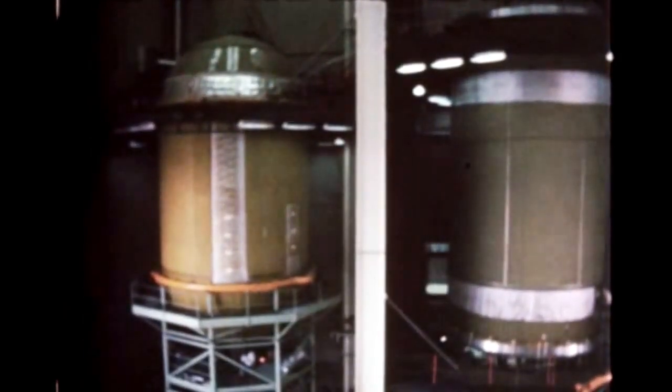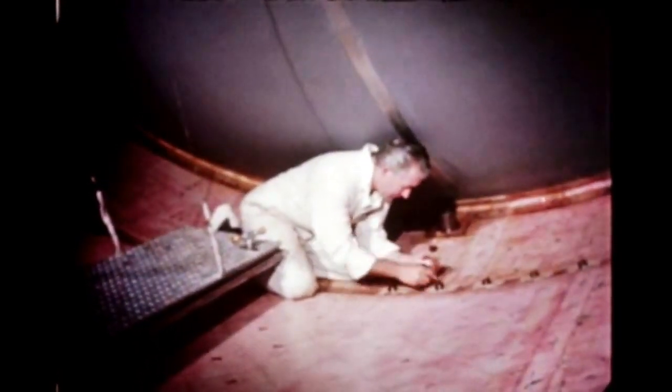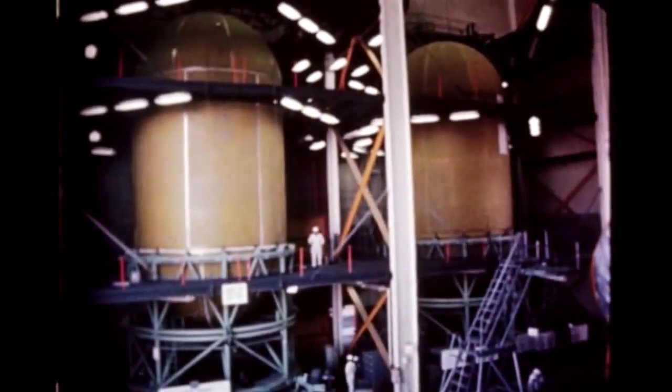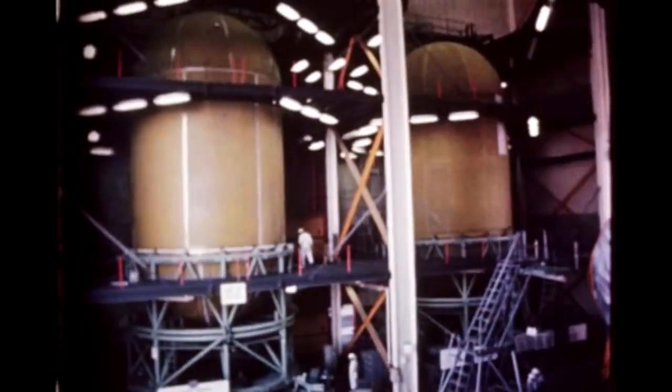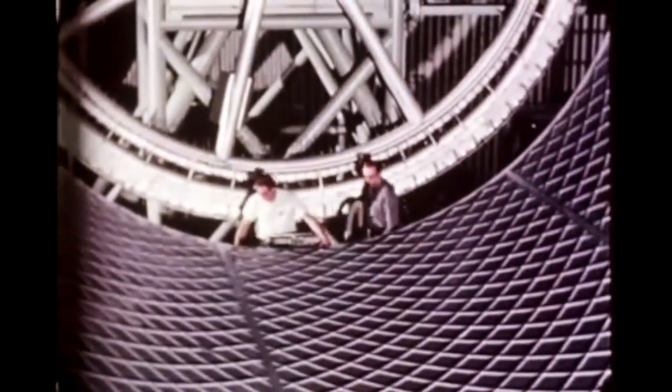Fabrication and assembly of S4B-1B flight stages is also well underway. At Huntington Beach, tank insulation of the S4B-1B1 first flight stage was completed this quarter. Work was also underway at the end of the quarter on installation of electrical and mechanical systems on the stage. Application of liquid hydrogen tank insulation on S4B-1B2 was completed in mid-December. Fabrication and assembly of the propellant tanks and thrust structures for S4B-1B3 and 1B4 continued during this quarter. Tank insulation for both of the stages is scheduled to begin next quarter.